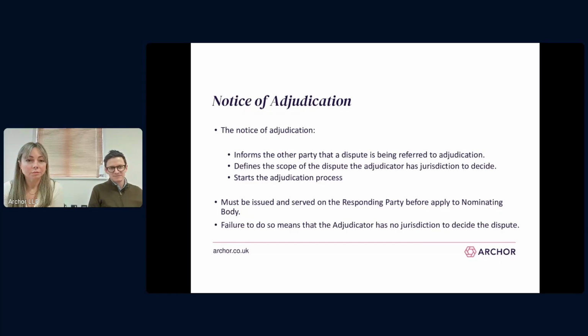The scheme sets out the minimum requirements for a notice of adjudication, and probably the most important ones are the party details, the details of the dispute, and the redress sought, and we'll come on to the redress sought in a moment.